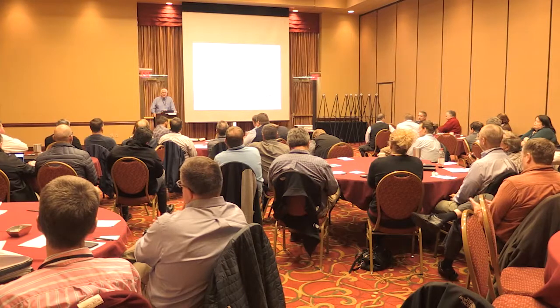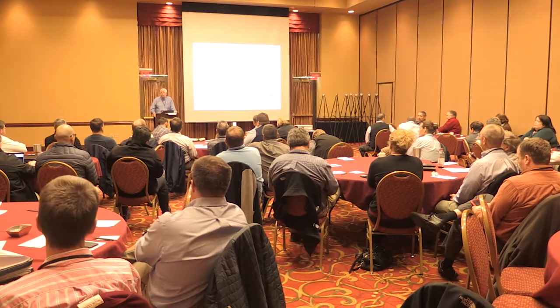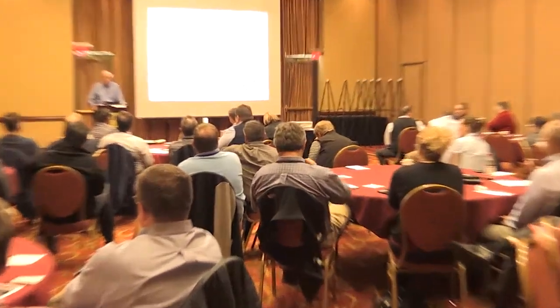Well, some states wrote into the RFP that the contractor shall have a quality control plan for right-of-way, which meant that the right-of-way agent for the contractor shall be certified, and that their staff shall show experience and or training to meet the Federal Highway Administration's Uniform Relocation Act as amended. Okay, so by putting that into a contract, what I just mentioned for right-of-way, do you think that would be a good idea?